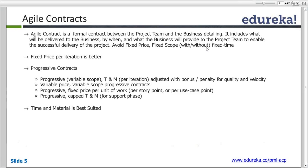Why should we avoid fixed price and fixed scope fixed time in Agile? In the case of fixed price, let's assume I say I will deliver this website for $100 because internally I thought it would just take 20 hours of effort. But since I was working in Agile, there was scope creep, things started changing, and what was decided initially did not hold — it ended up taking 50 hours of effort. But since it was a fixed price contract, I can't ask for more money, yet I spent 150% additional effort.